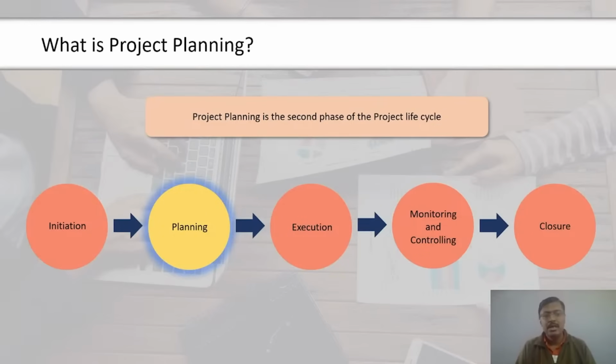Then I'll move to the cap. I'll speak about all of this relating to the cap. I do estimation of that. Then I'll speak about the mount, the mirror mount. Then I'll speak about the motor. Likewise, from bottom up, I will do it for every element and keep consolidating upwards.